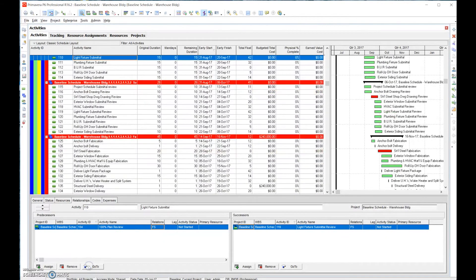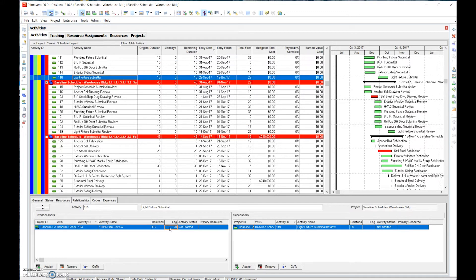This brings up a great point: for pre-construction activities like submittals and long lead items, it's okay to have excess float. A better way to eat up the excess float is not necessarily at the successor end, but on the front end. For example, if we have 40 days, we might reduce it to 20 days, bringing the float down from 42 to 22. This prioritizes submittals by adding lags, though you have to be aware it can create constraints.